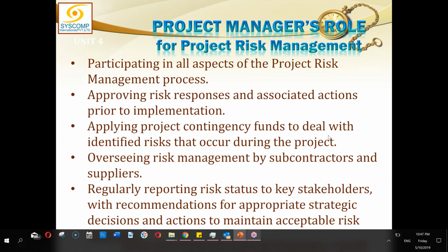Applying project contingency funds to deal with identified risks that occur during the project. Overseeing risk management by subcontractors and suppliers. That is also an issue. We have a number of outsourced projects or subcontracts, and we have to see their risk management as well. Regularly reporting risk status to the key stakeholders with recommendations for appropriate strategic decisions and actions to maintain an acceptable risk level.